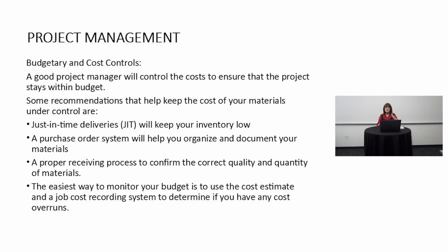Budgetary and cost controls. A good project manager will control the costs to ensure that the project stays within budget. Some recommendations that help keep the cost of your materials under control are just-in-time deliveries. That will keep your inventory low.